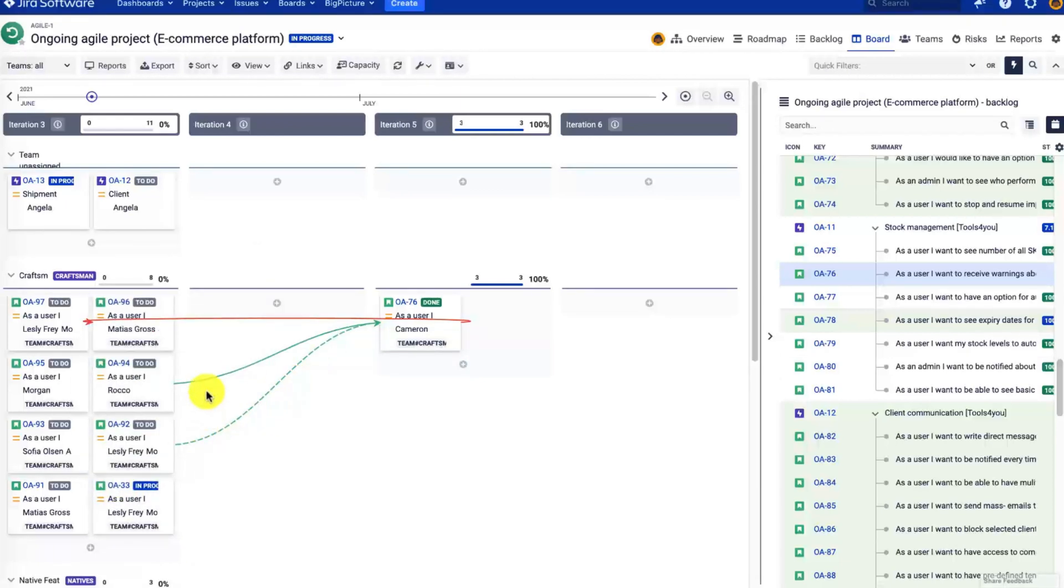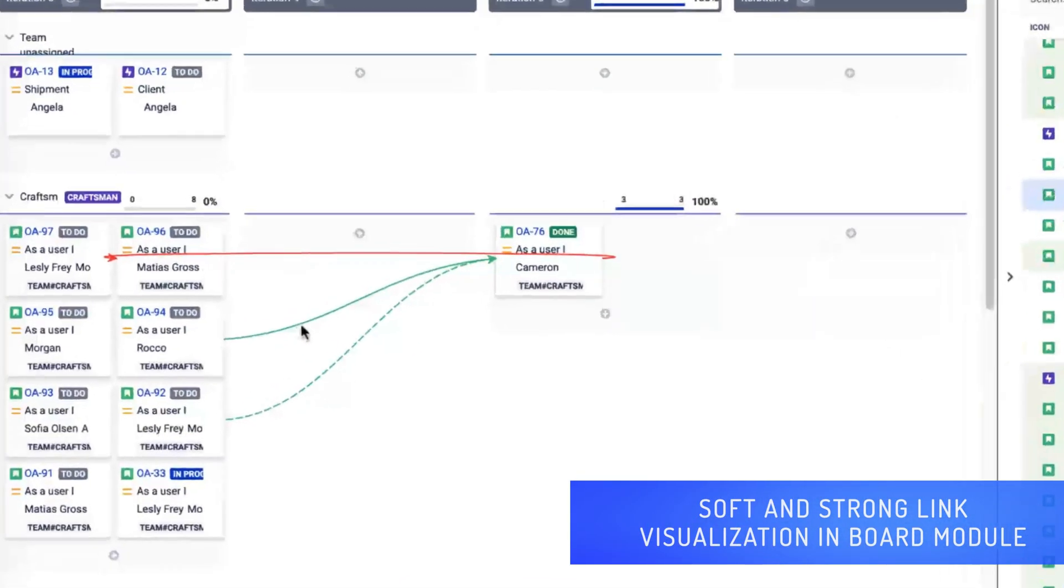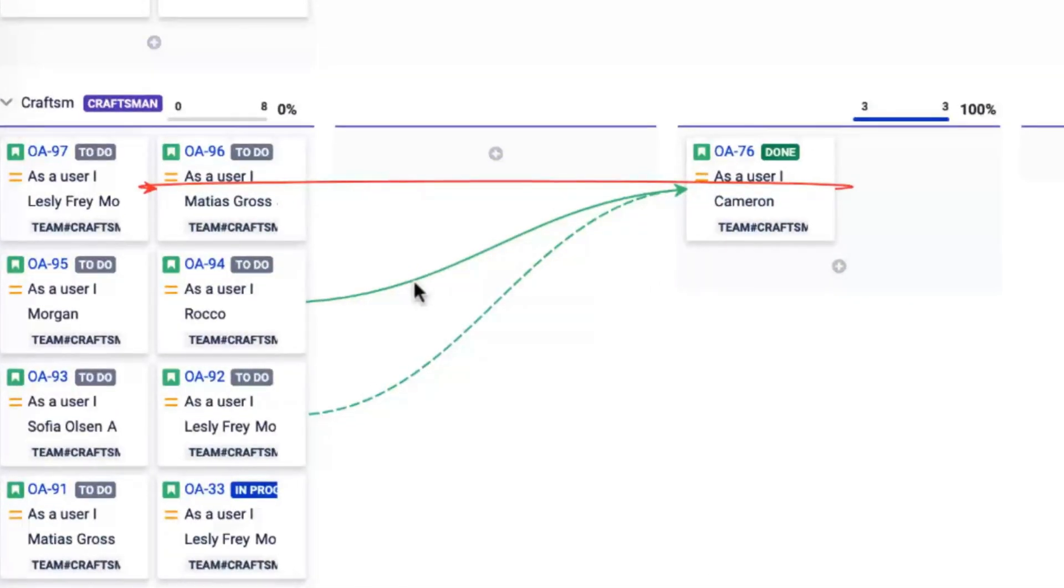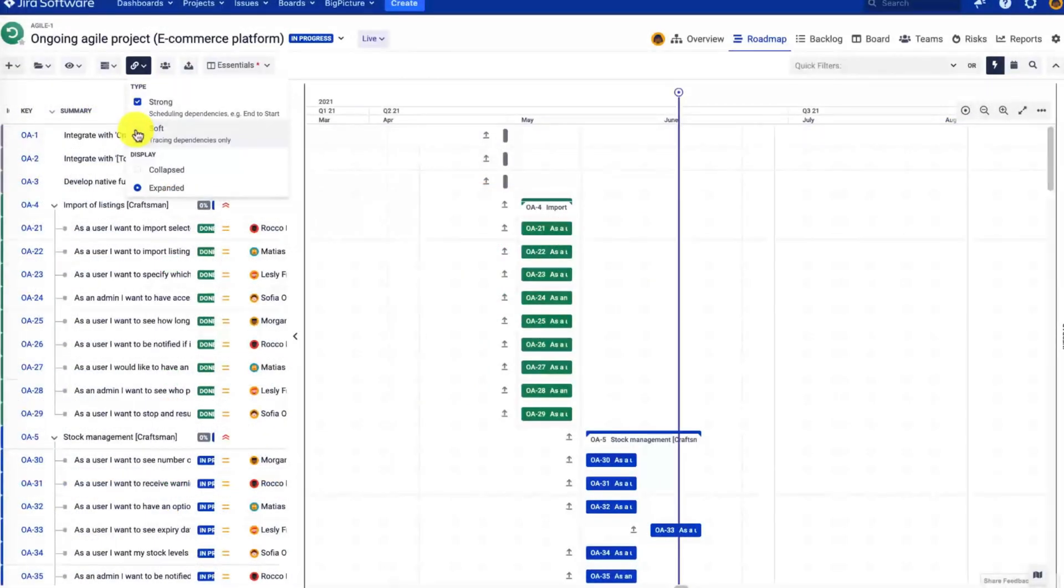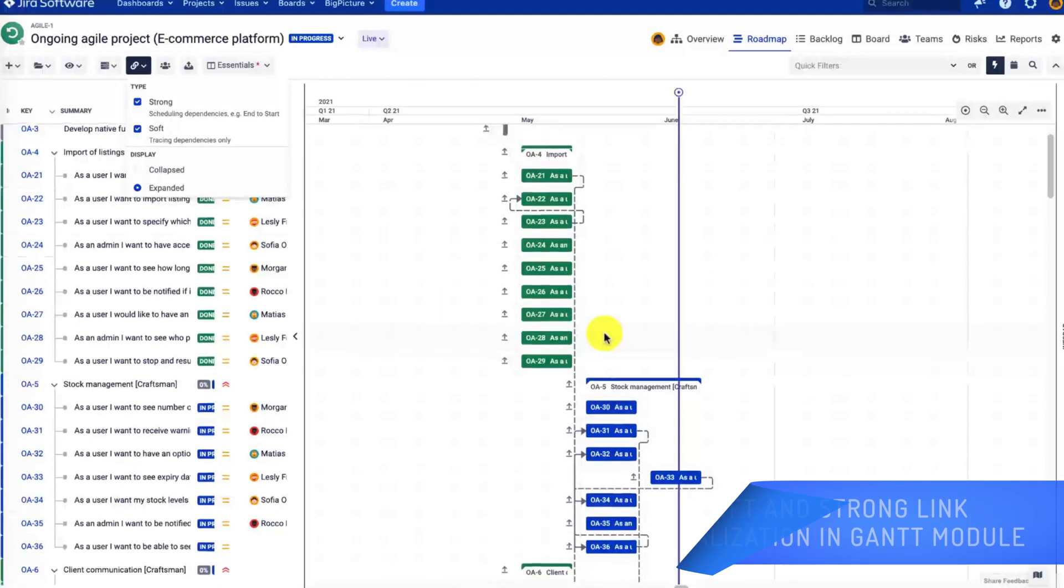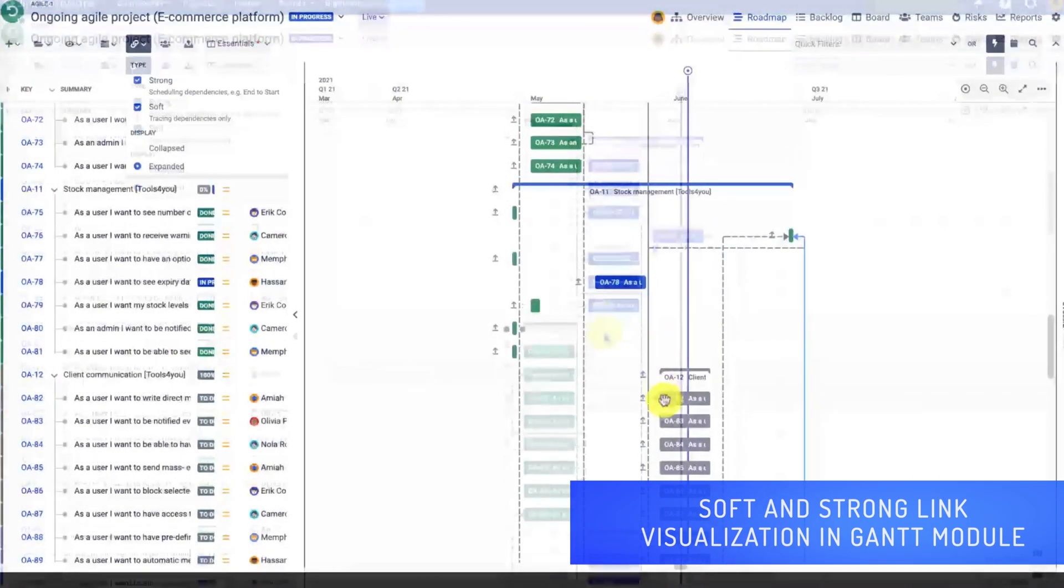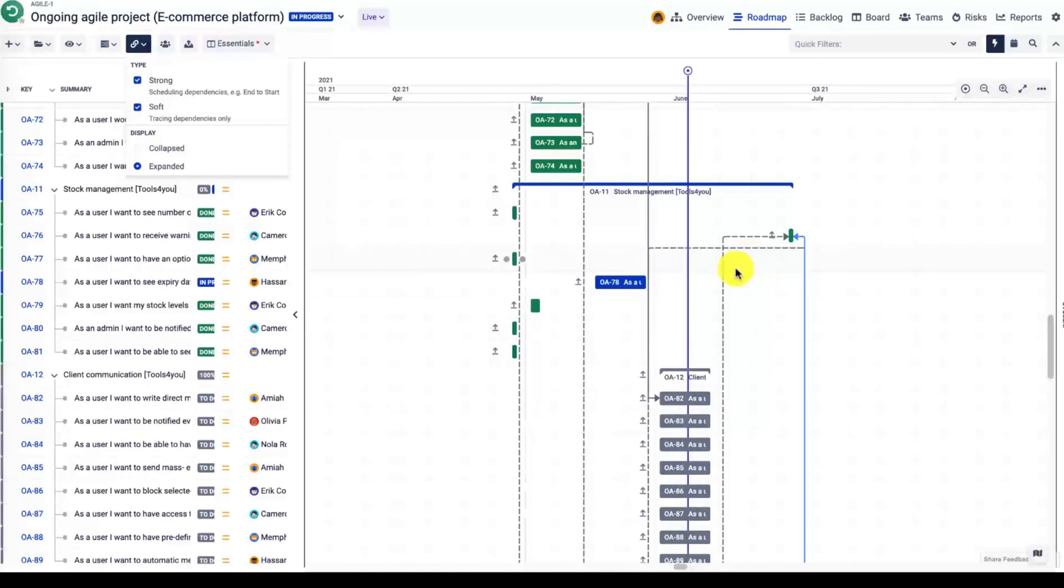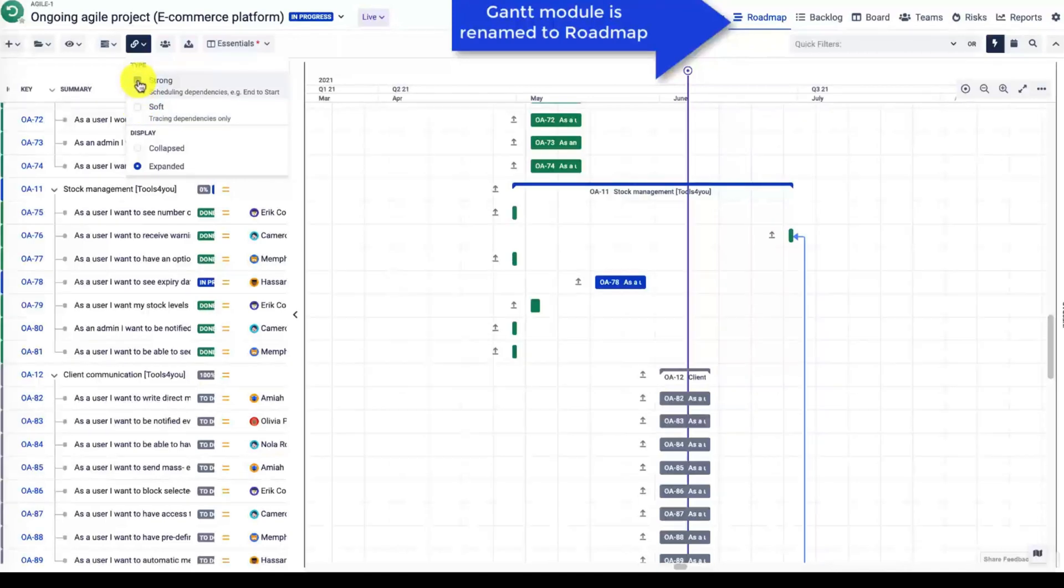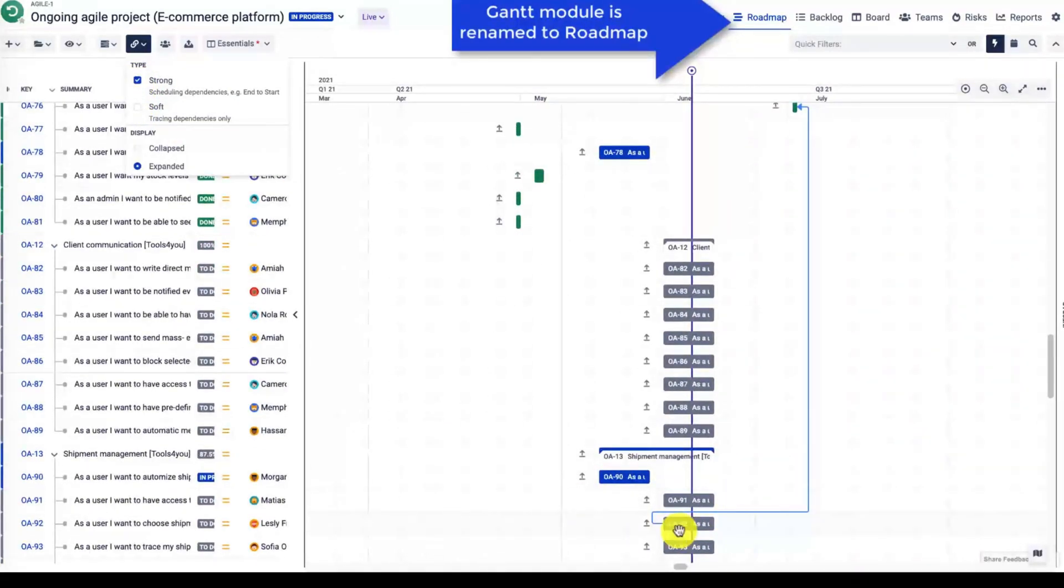As you can see, the link is drawn as a dashed line and the soft links are indicated with the solid line. The default link of the board module is the soft link. In case of the Gantt, the default link which you create using drag and drop will be the strong link. Depending on which edge you start dragging the link from—the right edge or the left edge—you will start with start or end type of link.